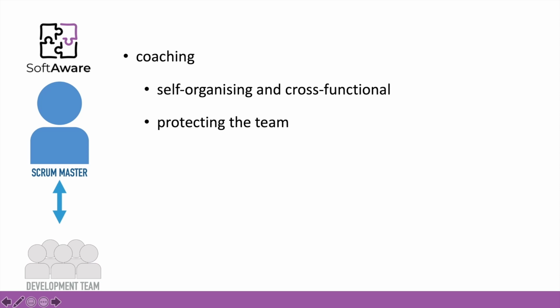Once the development starts and an iteration starts, the Scrum Master needs to address the fact that no one should be interacting with the team, because the team and the work that the team is conducting needs to be protected so that they can focus internally and deliver what they committed.